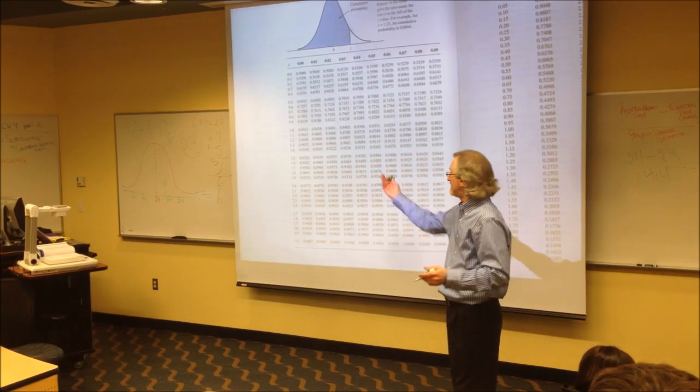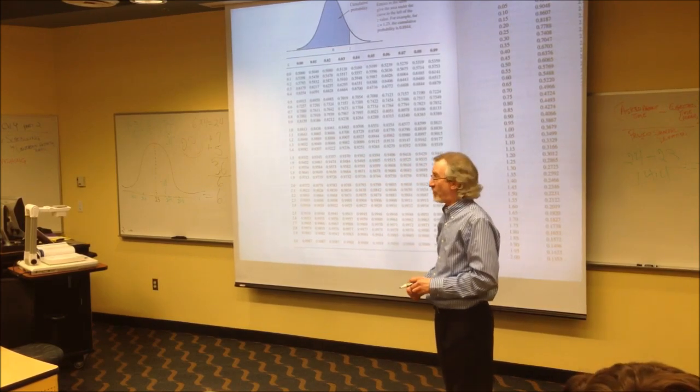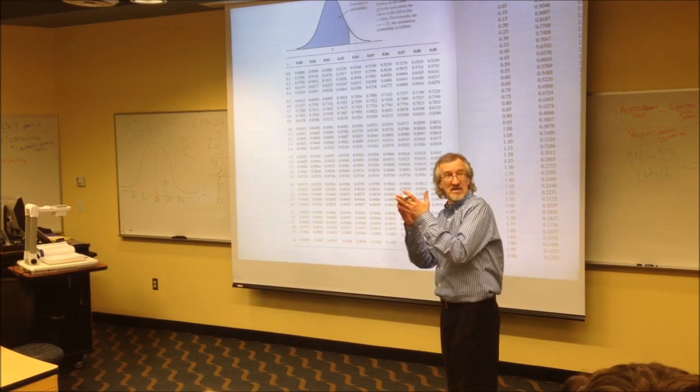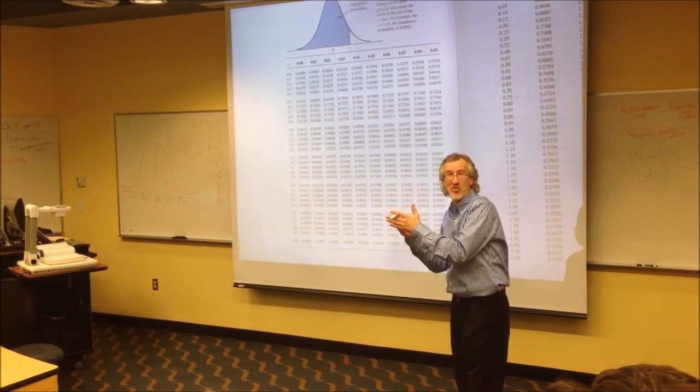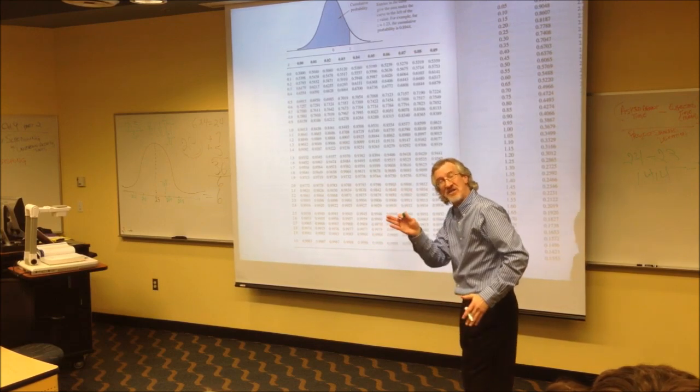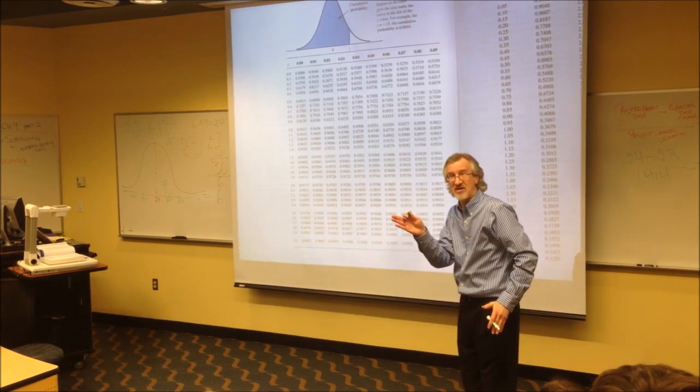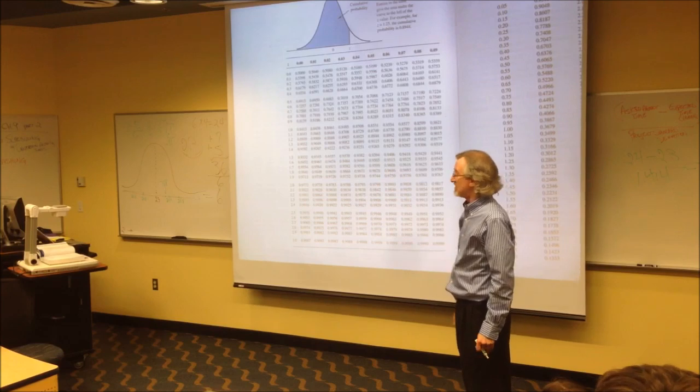Couldn't hear you. What's the opposite of 76? 24% chance. What we just calculated is the percent chance it will take an amount of time, which in this case is 24 or less. The opposite, that it will take longer and won't be done in time, is 24%.